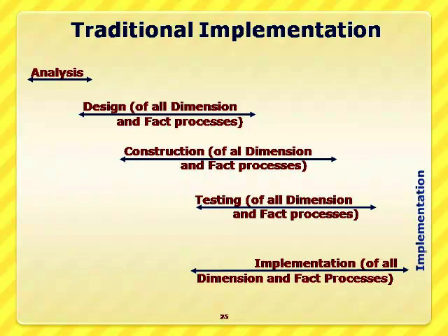That means I am building a data warehouse for all dimensions and fact processes at each stage of the construction process. That is the traditional model. Generally, this traditional model is likely to fail for large projects, and it also takes a long time. Experience shows that it is not a preferable methodology for implementing a data warehouse, especially in large organizations. So what alternate options are available?